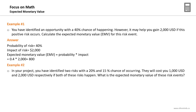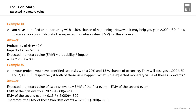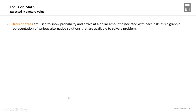Another example: in your project you have identified two risks with 20% and 15% chances of occurring, costing $1,000 and $2,000 respectively. Both are threats, so you give them negative signs. You calculate the EMV for each risk and sum them. The total EMV is: (−20% × $1,000) + (−15% × $2,000) = −$200 − $300 = −$500 USD. The project EMV is the sum of individual risk EMVs, with positive signs for opportunities and negative for threats.